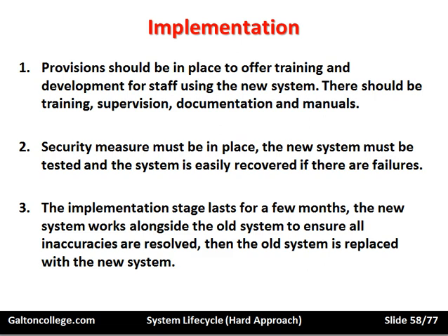The implementation stage could last for several months. The new system works alongside the old system to ensure inaccuracies are resolved and the old system is replaced with the new system. That's in the ideal world. In the ideal world, if possible, the old system is kept running because it's been tried and tested. Everyone's familiar with it, and the new system is phased in. So it's brought in part by part until finally the new system replaces the old system completely. The old system is turned off and the new one is now in place.